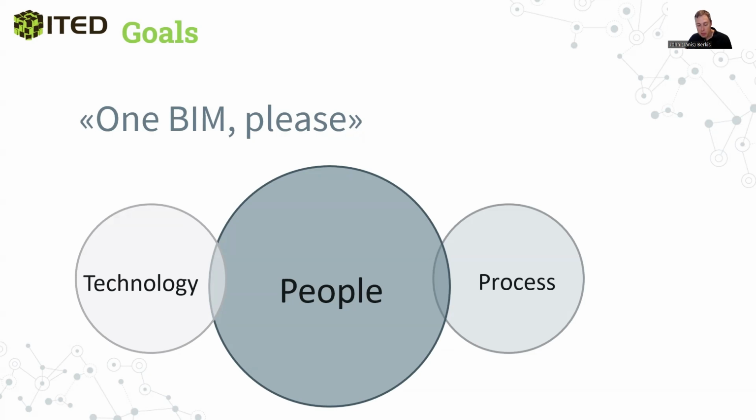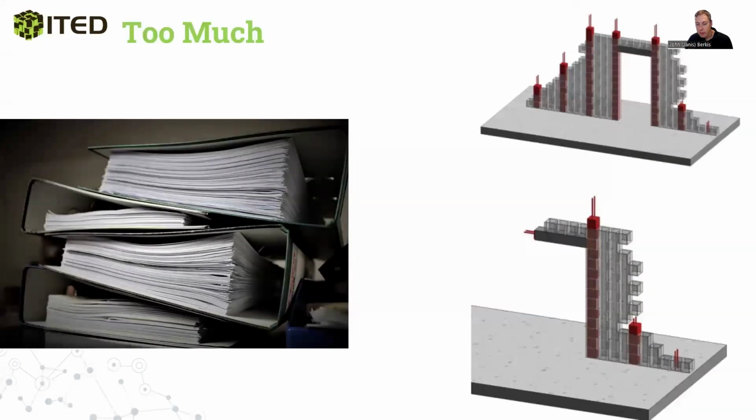And yet, I still see in many projects in the design briefs that the client tries to define BIM requirements in just a few short sentences. So the result usually is misunderstandings, unmet goals, and basically a lot of wasted time. The other extreme is overly complex requirements, and this is also quite common. For example, asking for high geometric detail of the 3D elements rarely serves any purpose and drives the cost up.